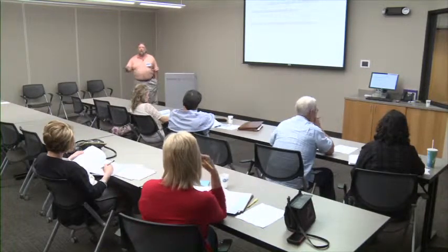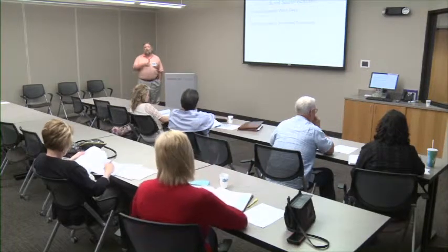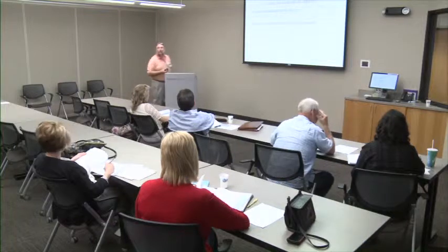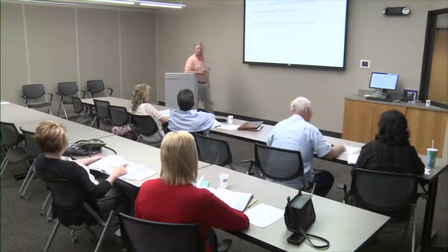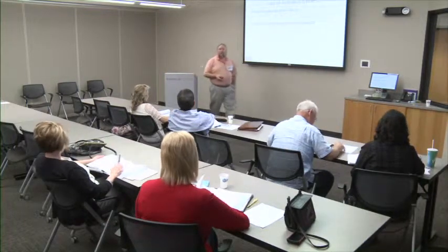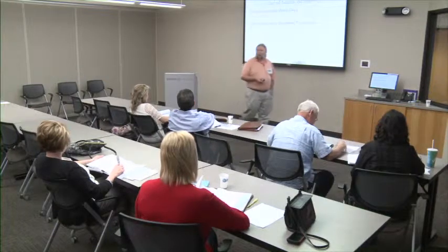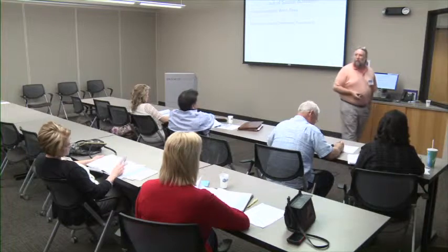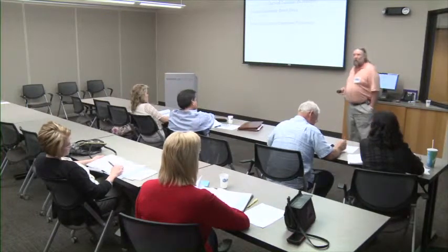Now, it's better to put 5 days in and adjust your duration because what if it's like this winter? If you put in that I wasn't going to work in January in my schedule and you chose to adhere to the fact that I didn't need to work in January because the weather was going to be bad, you'd have missed 30 days of good weather to work in.